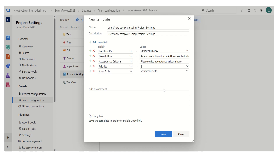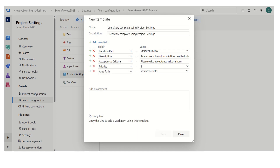What will happen is when we are creating our new work items in our Azure project, we have the option to either fill in all the details or choose this template. What it will do is populate these five fields with values — iteration path, area path, priority, description in a particular format, and acceptance criteria. So let's save it.